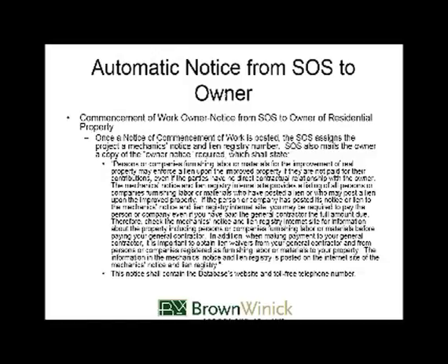So one of the questions is, when does this notice have to be given? And that has to be given within 10 days of starting work on the project. So one of the things you list in the notice is when you started, so you can check when you start versus when you post the notice. So it's 10 days.